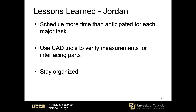Key takeaways: each task required more time than expected, so it's important to dedicate more time than you think to each major task. It would also have been helpful to dedicate someone on the team to learn CAD software such as SolidWorks so we could verify measurements and show that components would fit together correctly prior to assembly — we did have issues with incorrect measurements and parts not fitting properly. Finally, as a team we could have done a better job of staying organized, perhaps by documenting team meetings better and creating a written record of the main points to refer back to.